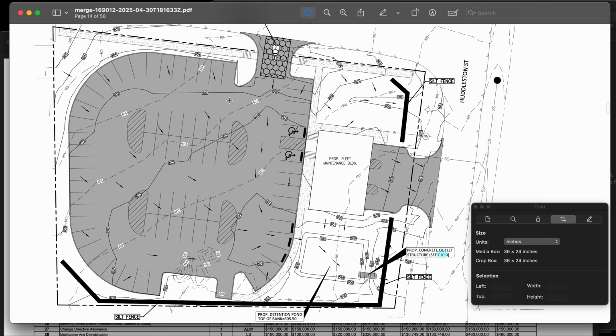Okay. Now, with that being said, we have 400 feet of silt fence, a wash-on pit, and a construction entrance. Just off the top of my head, you're looking at $7,500 to $8,500. Well, no, $7,500 in your erosion control. Roughly $5,000 for roughly, I'm going to say 45 for the construction entrance, 25 for the wash-on pit, and then 1,500-ish for the silt fence.